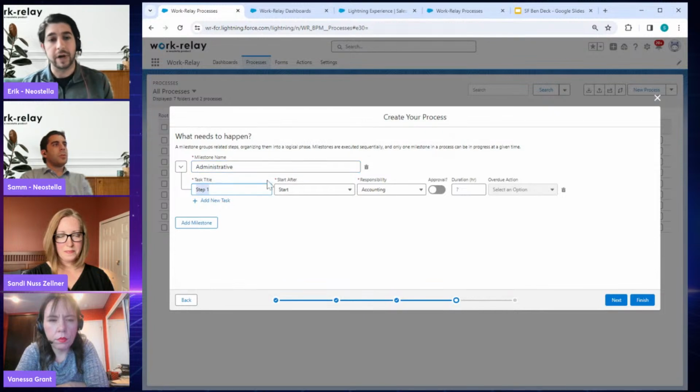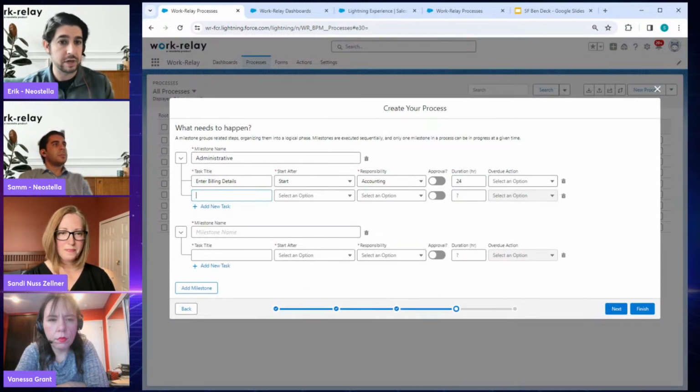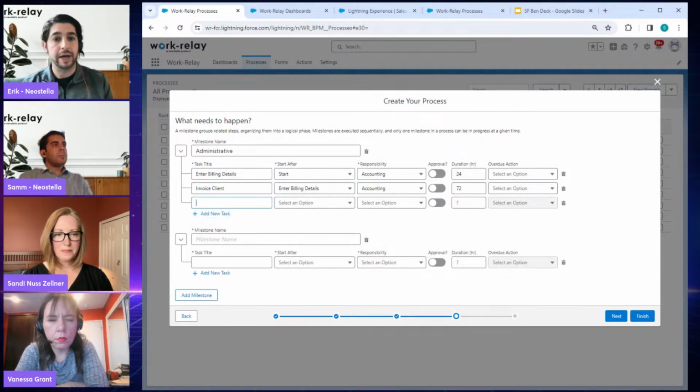So defining those responsibilities, think of them as swim lanes. We'll see them represented that way later on. The people that are responsible, whether that's users or groups or queues, we've got access to all of the Salesforce features that are available to us, since we're on the platform. And then we want to start breaking our process into those milestones. What happens at the beginning, the middle, the end, all of the phases in between, because there's typically more than 3, and starting to identify those objectives, the people that are responsible for them, and the order in which they happen.